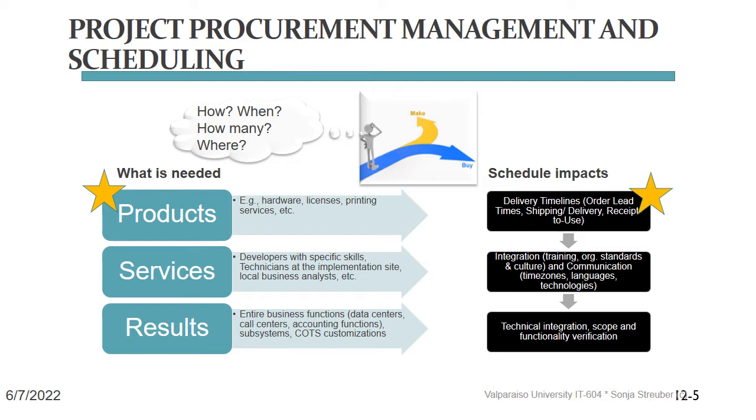They need to be ordered, delivered, and tested before you can use them. This means any tasks that use these items can only start after they have been received by the people doing the work.